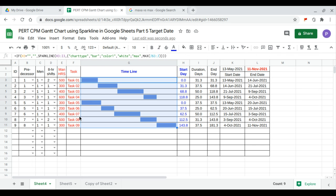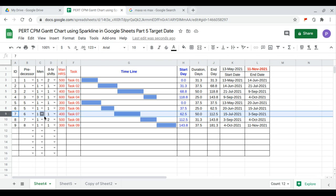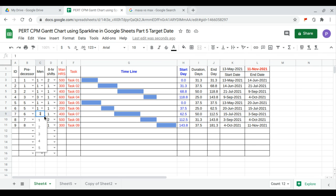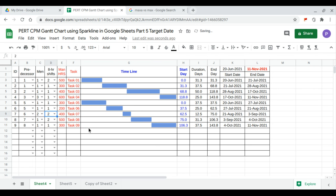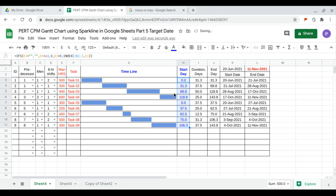I would like to have two shifts for task 6 and two men per shift on task 6. After updating, the schedule adjusts accordingly.